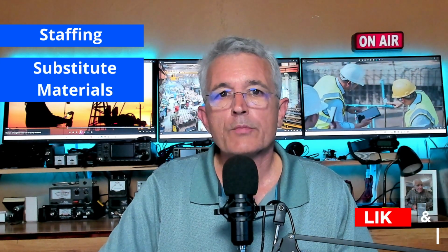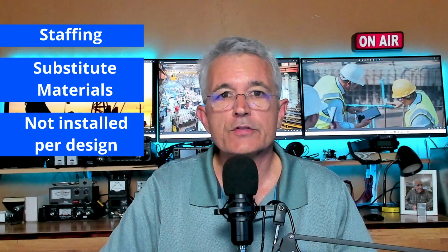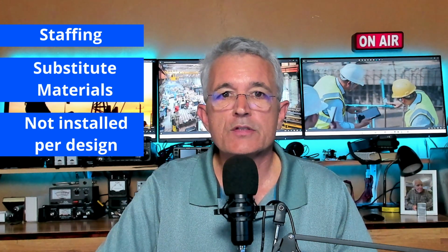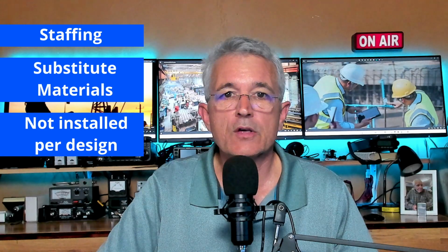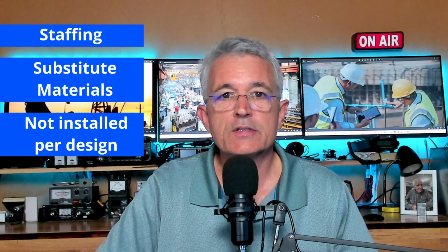The number 3 quality problem is products not installed per design, and this covers, again, all industries. And it's items such as not constructed to design dimensions for length, height, plumb, level, and square, or on a design slope, missing or wrong components, procedures not being followed, wrong or insufficient non-destructive testing. And again, this is connected to problem 1 and 2 previously discussed.